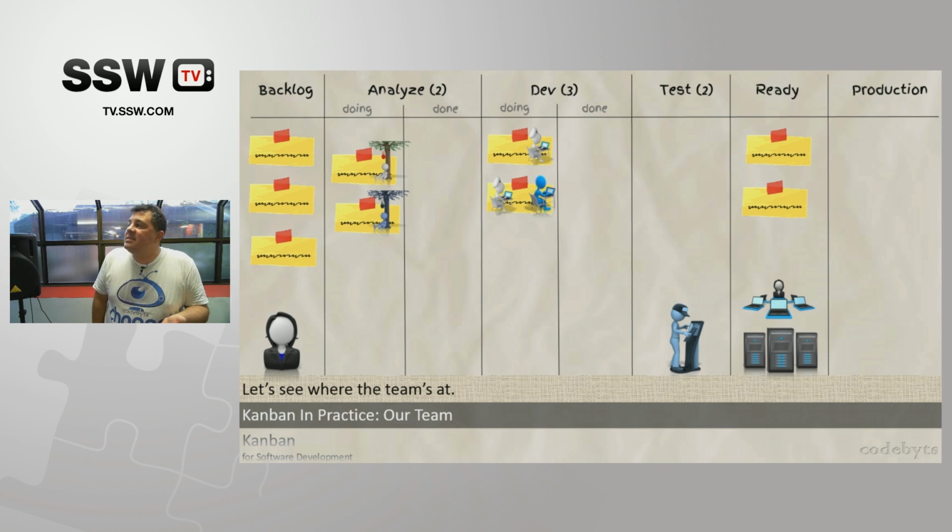So what does the tester do if this happens? And this can happen. This is real life. In this case, you look at your tester's skill set. We said, hey, neglected skill set. So you look at your tester. Can he develop? Sometimes the testers are developers as well. If that's the case, maybe I can actually pair him up with the first user story, the first developer, so I can have a bit of thing going on.